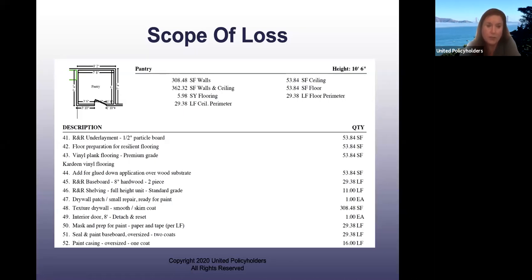The other thing that is super important for any of you who had houses with non-standard ceiling heights, okay, is that this program defaults to 8-foot ceiling heights. So see right here, this particular house had 10.5-foot ceilings. This is an old house in San Francisco.